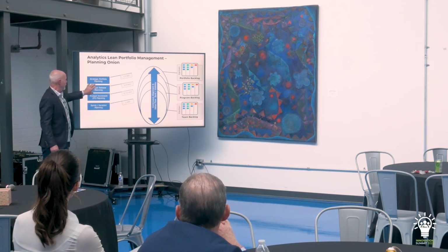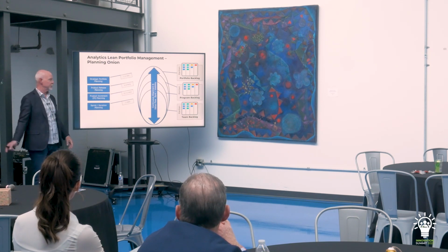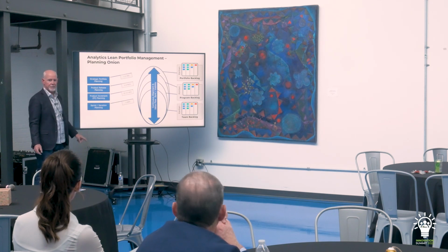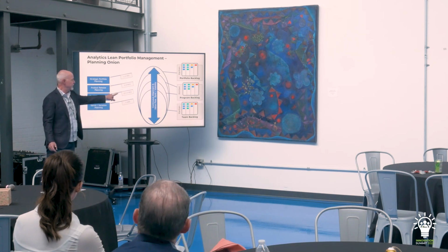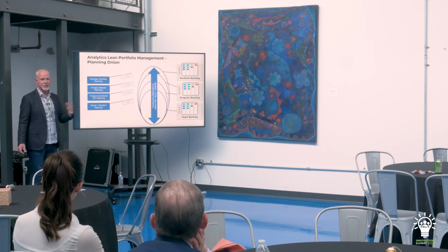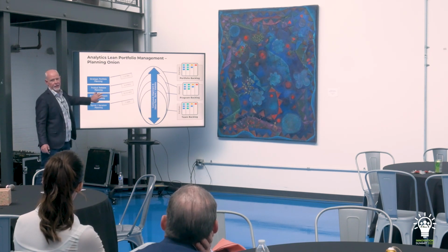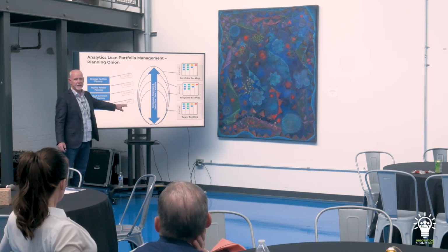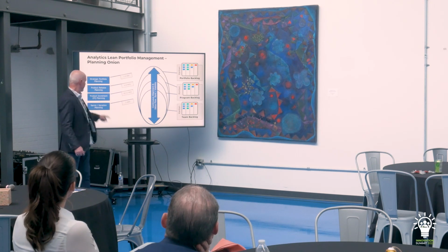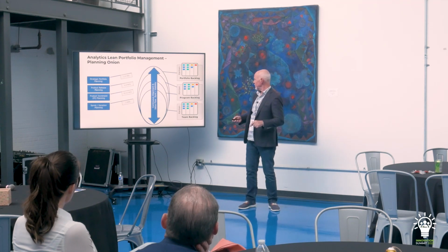And then of all the products that are in the product release plan, things I want to build over the next 6 months, we prioritize what we want to do next. This is going to be the product increment / MVP that we're going to roll out over the next 5 to 6 sprints, or 10 to 12 weeks, right? And then the objectives from the product increment drive down and start to populate the backlog for the Agile delivery team. So all the stories start to get populated here. And that planning is on a 2-week horizon. So every 2 weeks, which objective are we going to hit in this sprint? What software are we going to get working, et cetera. Does it make sense so far?